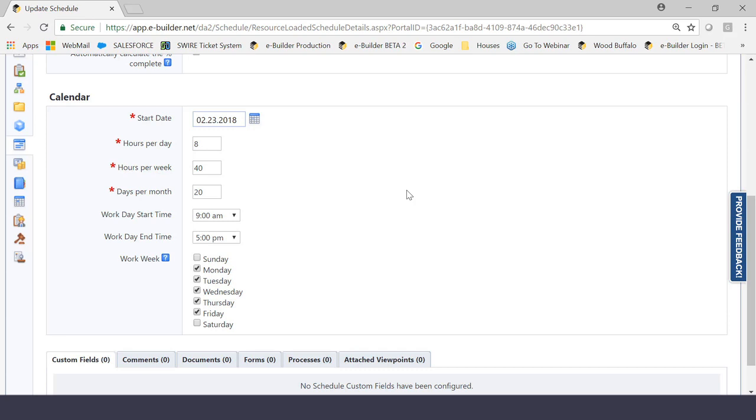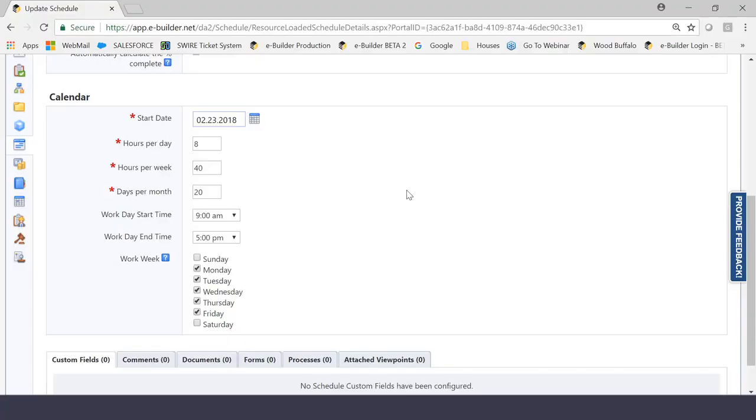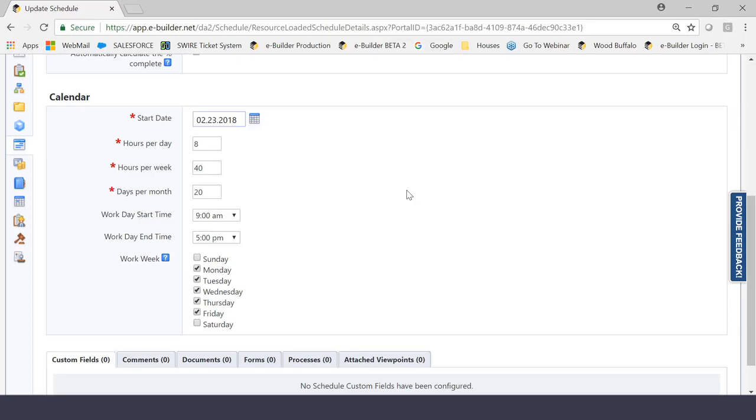The very first thing that you're going to choose here is what I would probably argue is the most critical thing, which is the start date. The start date is the date where you are beginning to bill or do something against the project budget. That is my interpretation. Everybody's interpretation is different. But the reason I say it that way is because some people would probably assume that the schedule begins when design begins or when construction begins. There are those phases that some of our clients use, which is programming, planning, when the funding is being put together. I would declare that the minute that time is being spent against the project, that would be the start date. And that would give you a better idea as to the length of time.